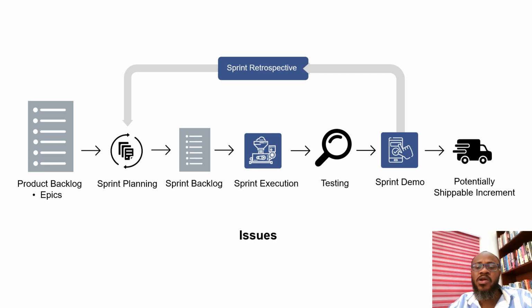The final thing we look at has to do with issues. Issues that are uncovered during sprint reviews or demonstration. What do we do? Whenever there is an issue, okay, and for which reason the feature increment cannot be finalized, the issue is fed back into the product backlog or the sprint backlog to be reworked on. Ideally, they are fed into the product backlog to be considered on the next sprint, depending on the degree of urgency.